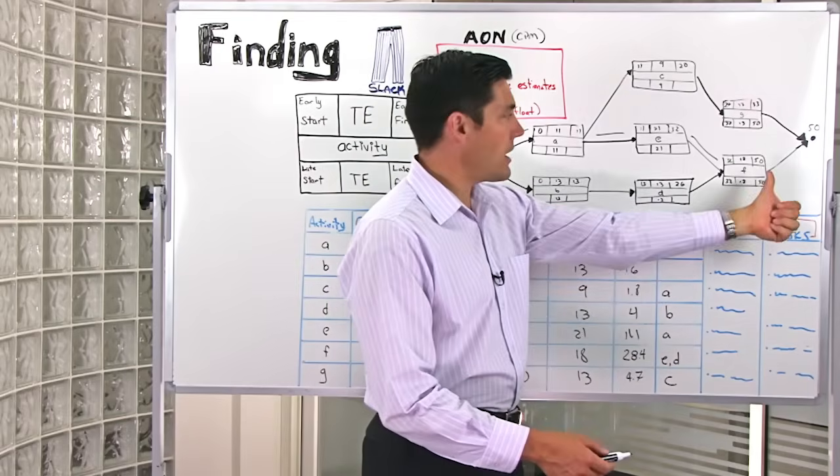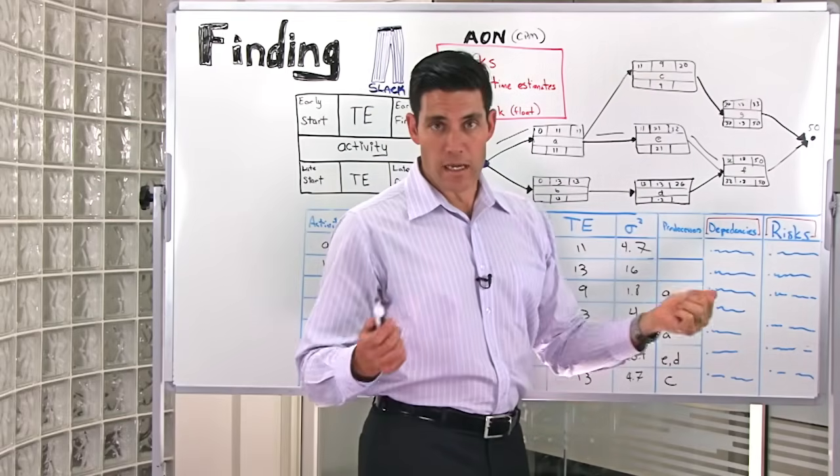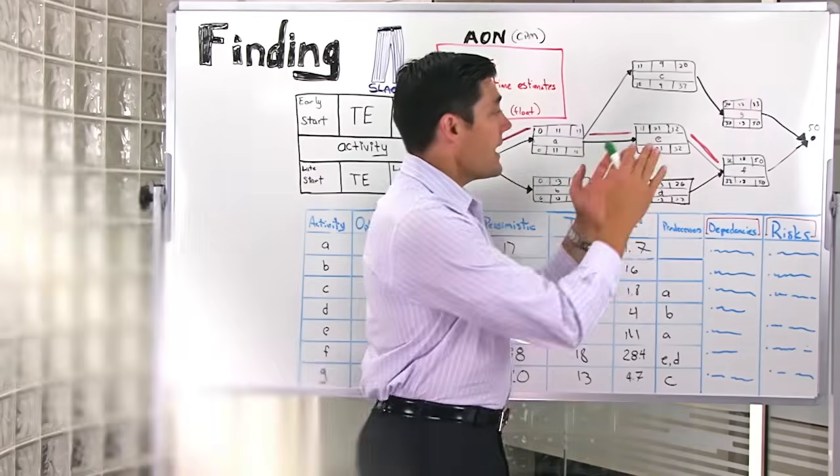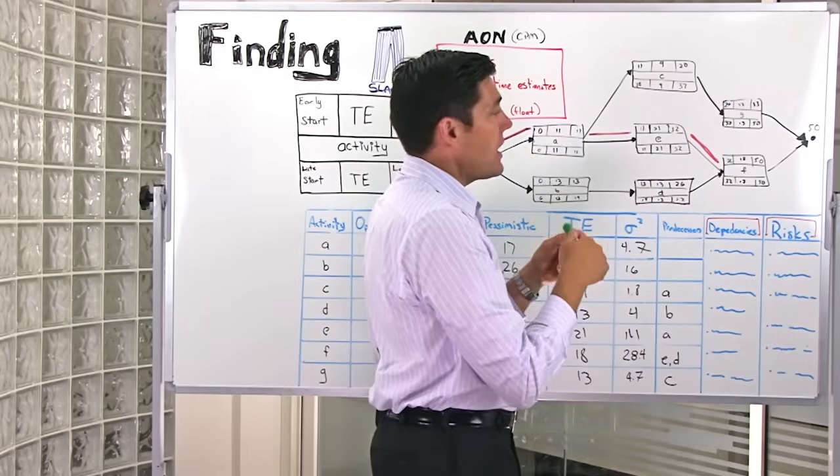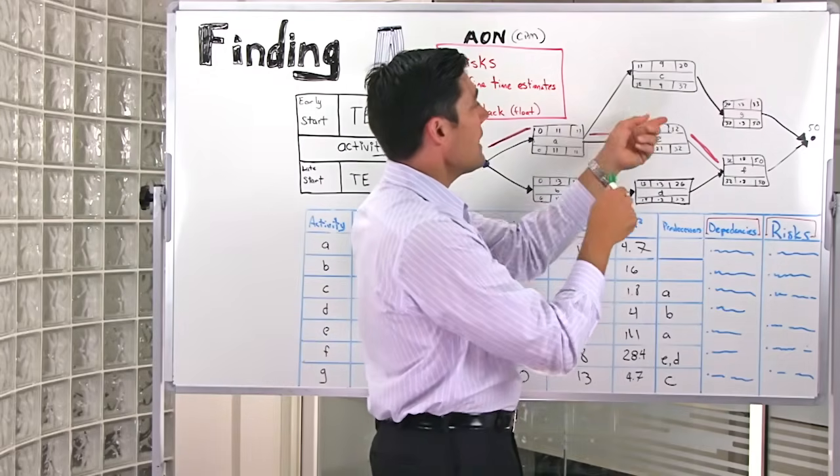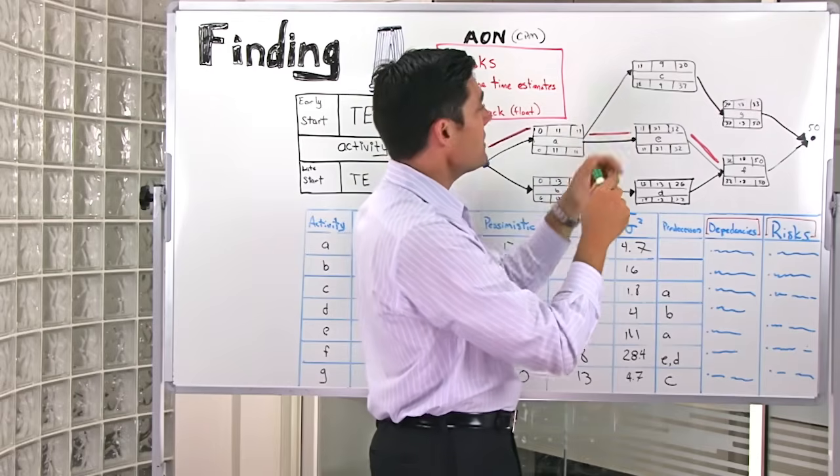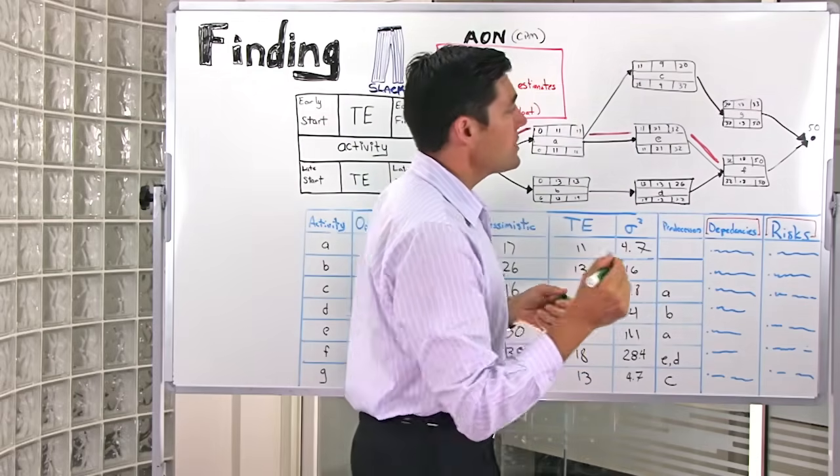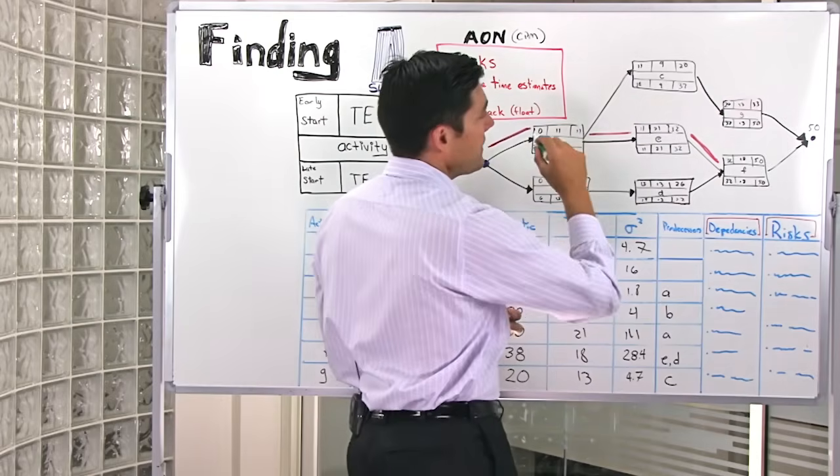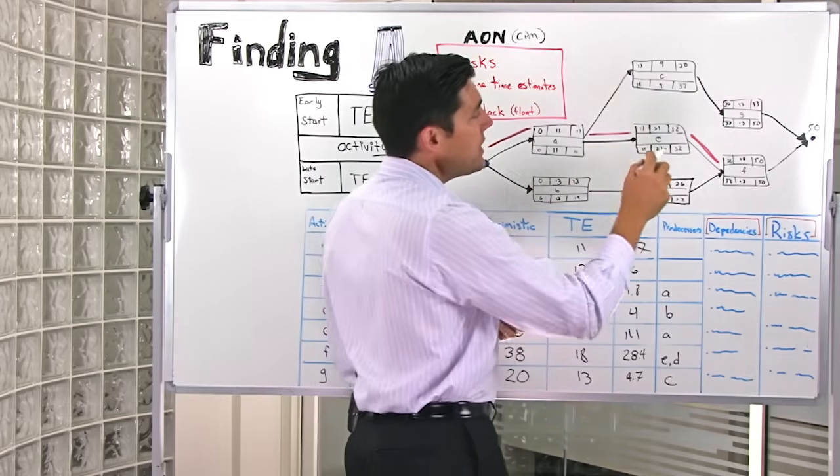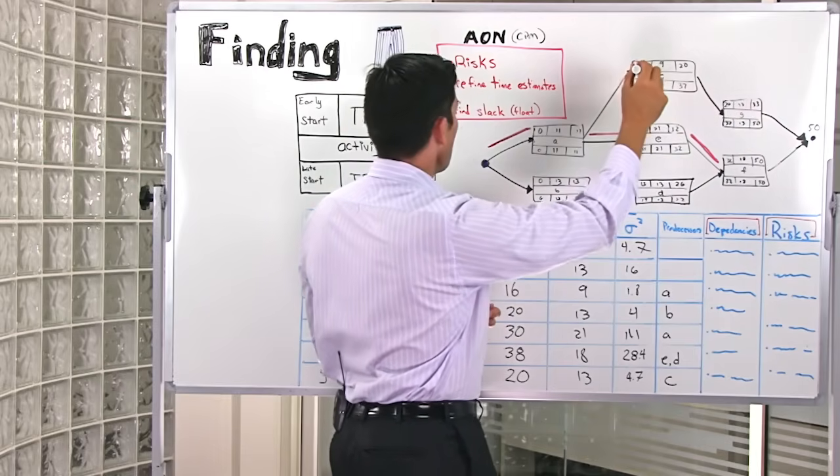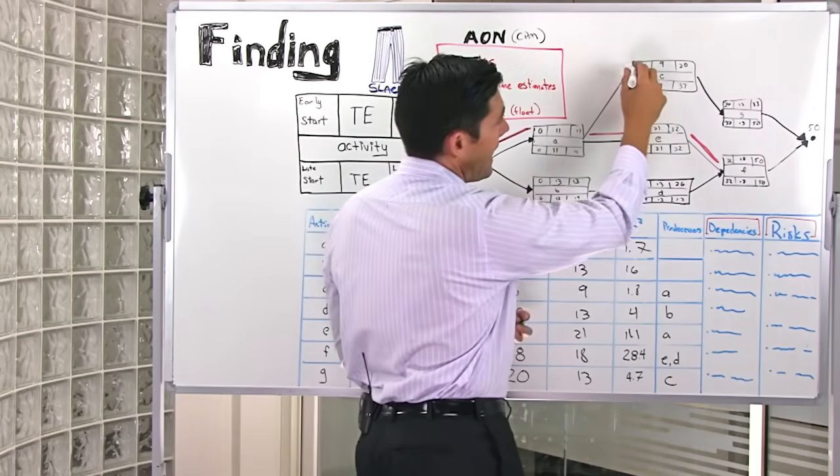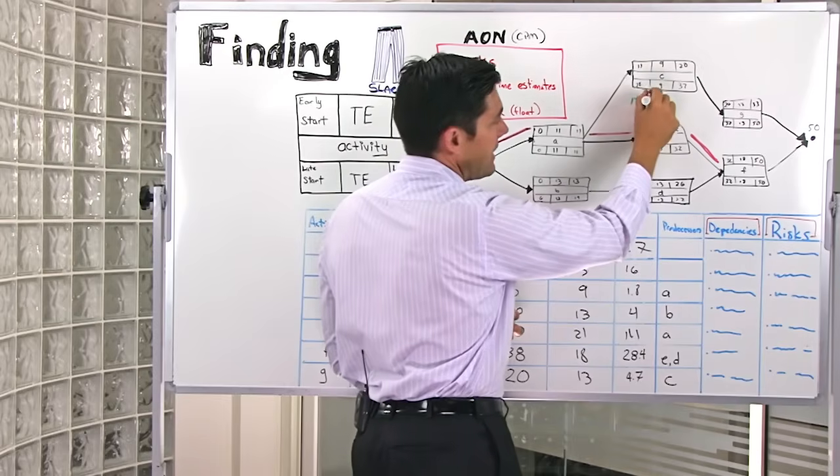Let's go back through the diagram, going backwards, and see where else we can calculate some slack. Now that I've gone backwards through the diagram and calculated all the late finishes and late starts, I can start to look at where my slack is in the schedule. So let's take the top path, the A-C-G path. We notice that there's a difference between the early start and the late start, and that difference is 17 days.